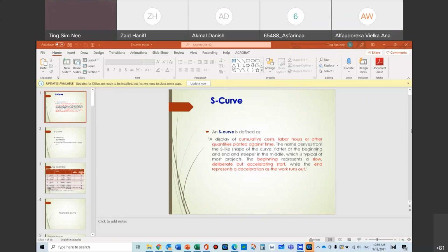And then you will send it out for tendering, for the procurement process to start. In the procurement process, the contractor will quote. They will go through the whole project like what the designers will go through, and they will come up with their own calculation. And then when the calculation comes out, hopefully it's very close to the estimates that you put in. If it's not, then the client will finally decide whether to go for that or not.